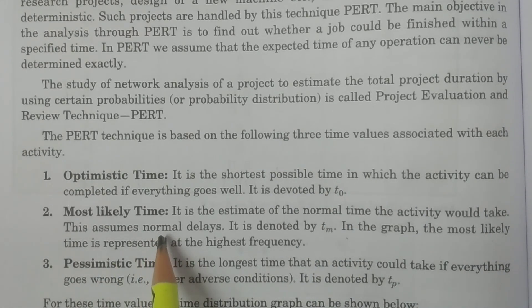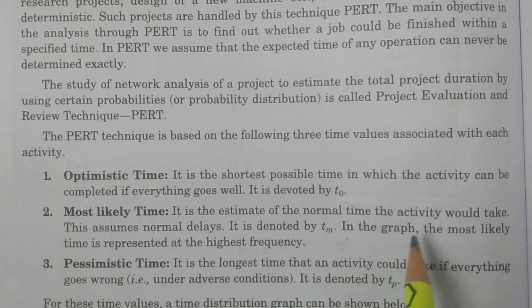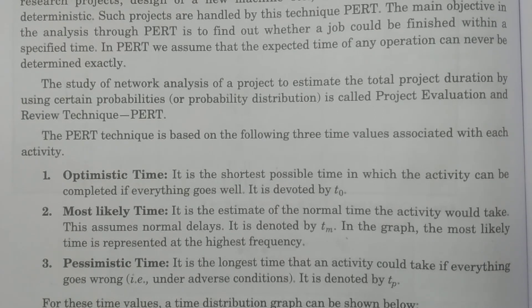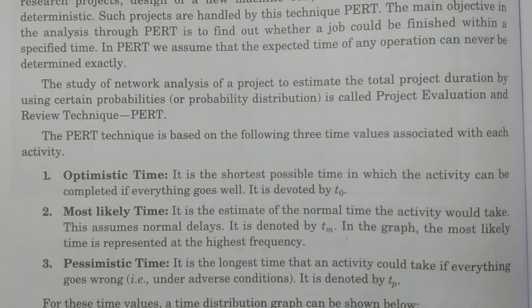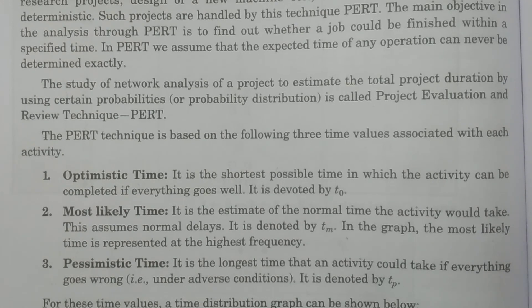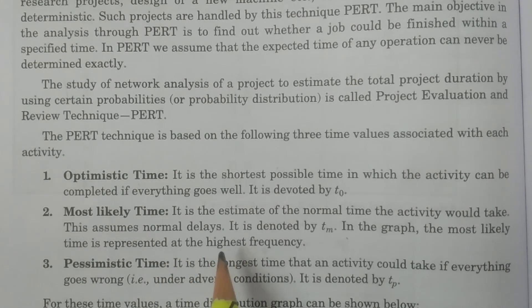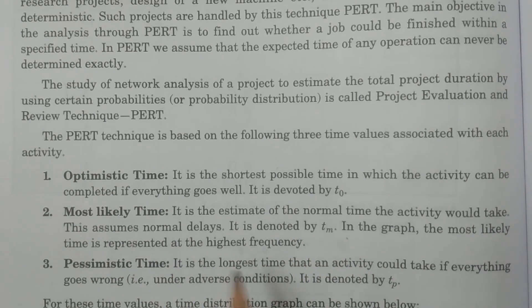Most likely time is the estimate of the normal time of the activity when the activity is going to be finished, and it assumes normal delays. For example, if 10 workers are to finish a work in 10 days and it goes well for four days, but on the fifth day only three or four workers attend, some delay takes place. Such normal delays are considered here, and this estimate of normal time is called most likely time, denoted by Tm. In the graph, it is represented at the highest frequency.